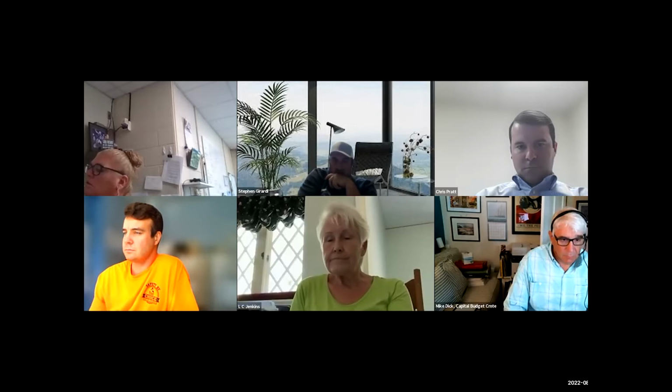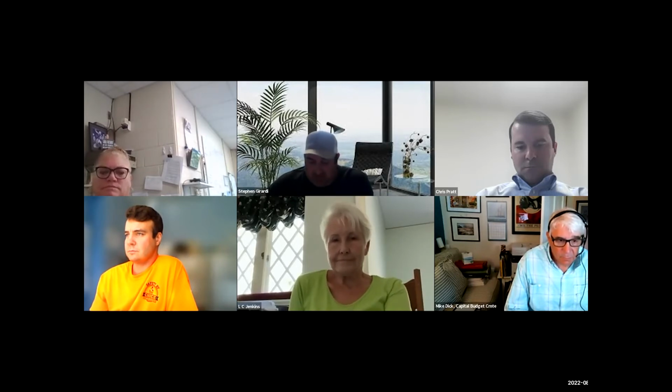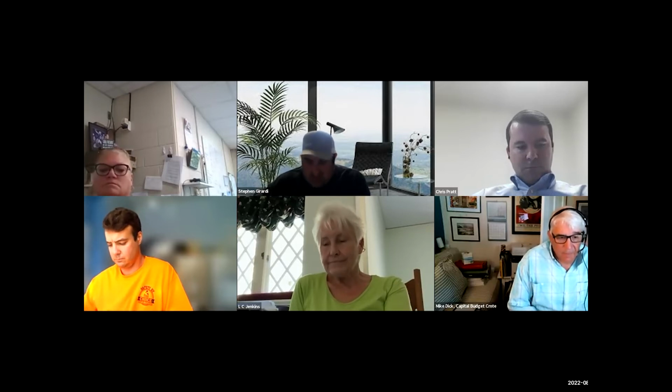So real quickly, when we got the initial quotes for the GAC system, they came in at 3.2 million, and just recently they had an update on their budget for us, which was 5.8. Did I get that right, Lee or Chris? Yes, it was 5.8 million. That's the number I saw in their PowerPoint, 5,895. So, just to keep you up to speed on that portion, because that's going to come up later in the meeting.